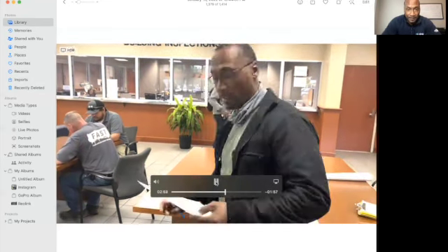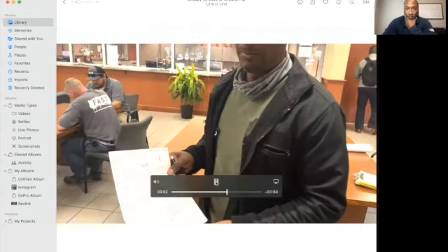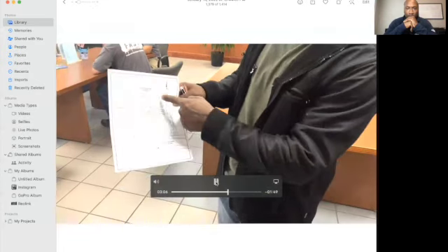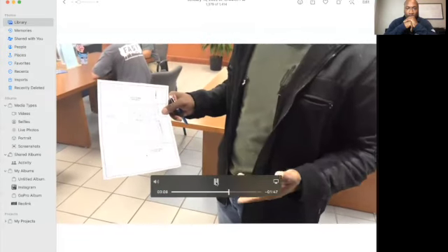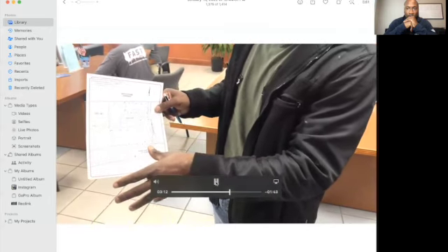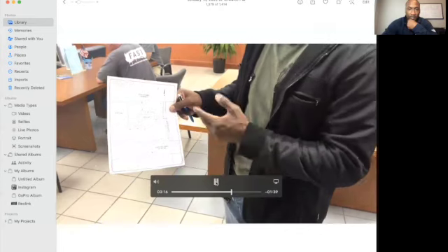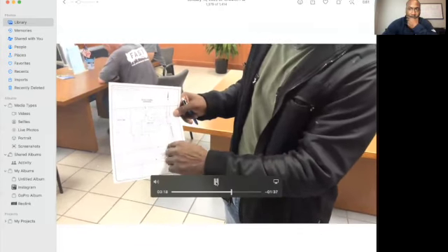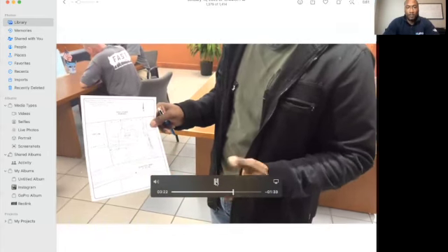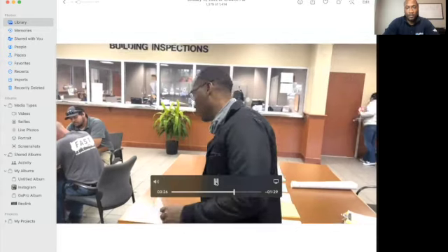One more thing you're going to have, this right here, is an erosion control plan. An erosion control plan tells us where the silt fence is going to be, to keep siltation from impacting the municipal roads and the inlets in the road. This right here is also gravel, to make sure we don't get a lot of mud and stuff in the road from the trucks and everything. So these are some of the things you're going to need when you do the permit.